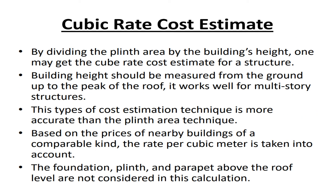Cubic rate cost estimate: By multiplying the plinth area by the building's height, one may get the cube rate cost estimate for a structure. Building height should be measured from the ground up to the peak of the roof. It works well for multi-story structures. This type of cost estimation technique is more accurate than the plinth area technique. Based on the prices of nearby buildings of a comparable kind, the rate per cubic meter is taken into account. The foundation, plinth, and parapet above the roof level are not considered in this calculation.